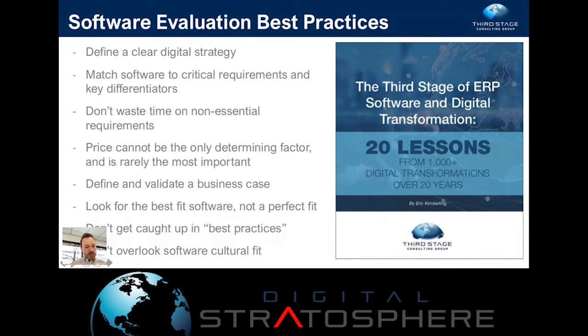And the business case is also important from a governance perspective when you go to implement, because when it comes time to make decisions around whether or not you should customize or whether or not you should add new modules or take advantage of new functionality that the software vendor is trying to sell you right in the middle of the implementation, you need that business case to be your North Star to help you make decisions to say, can this incremental cost and impact to the project be justified by something in the business case? And if not, then you probably bypass it. And if it does, then maybe you allow for the scope creep or the increase in cost or the added modules or whatever the case may be.